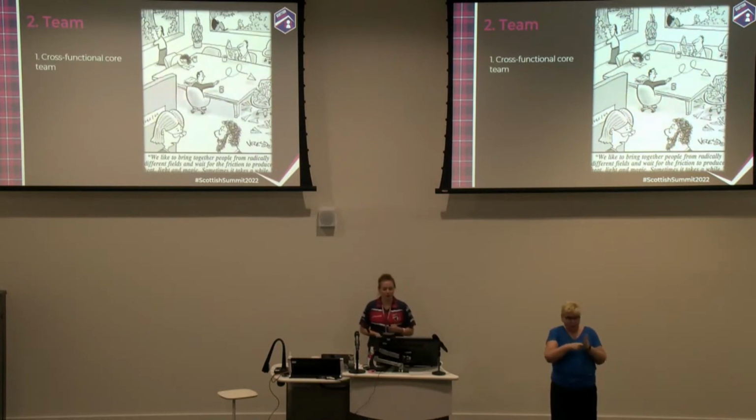So what I say about cross-functional core teams, 20 people, I actually say is way too much. You have a core team that actually consists of one or two for each different subject. You have people from IT, you have people from business, and you have people that are decision makers. That is your core team. They make the first creation and then they branch out. They delegate, they figure out what they need to get, and then they involve more people. But the core team, keep it small. Keep it to as few people as possible. The decisions will come easier and you will hopefully reach the targets better.